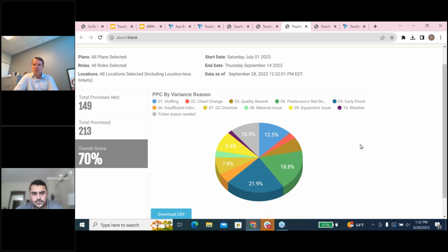Yeah, a lot of it basically created the opportunity for the conversation. If there was something going on, work wasn't ready for me, okay, why wasn't it ready? Okay, well, it's because the electrician said it was going to be done and it wasn't. Well, the electrician did put it in Touchplan like it was done, but why isn't it being done?